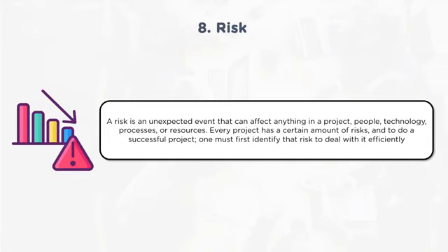Another gap which we see in risk management is that it is done in the initial phase of the project. As the project is kicked off, someone will do the risk assessment and have a list of risks identified, but unfortunately there is no categorization for that risk, and how it is going to impact the project is not clear. Thirdly, the list of risks is created only once. It is not done repeatedly.